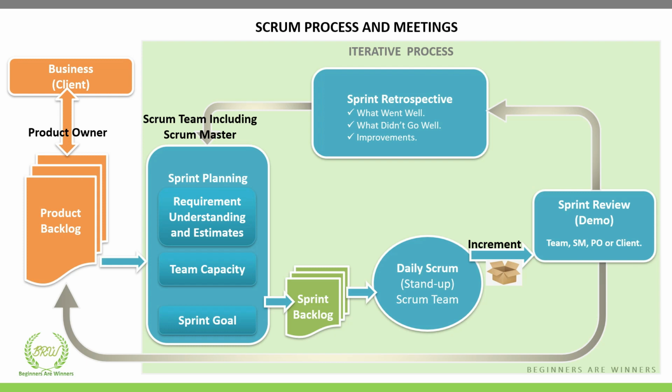After that, the sprint review or demo will happen on the last day of the sprint, which means the team presents sprint results to the product owner to check if they have met the goals that had been set for the team. For example, if the demo is for a login feature, the development team will give a walkthrough of how the login feature works and what becomes visible after login, along with other features as appropriate for the demo from a feature scope standpoint.